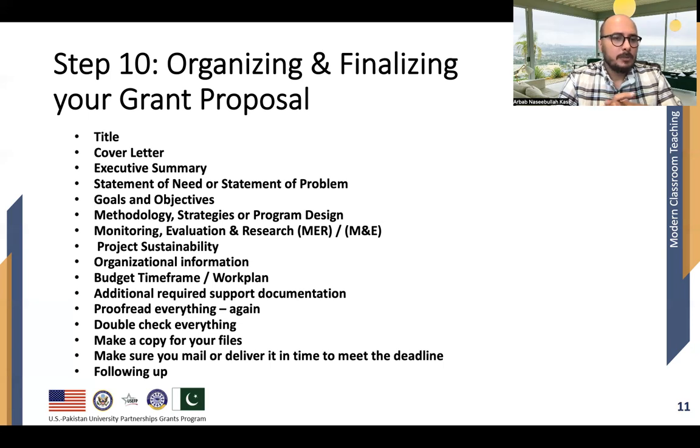And when you are done with that, I am also going to specify a few more things. Specify all sources of income and contributions also. That includes your volunteer service, but you have to calculate it at market value, how much it would cost. State all indirect costs also, and the overhead associated with your administrative expenses, because indirect cost is also very important to be reflected in the budget.